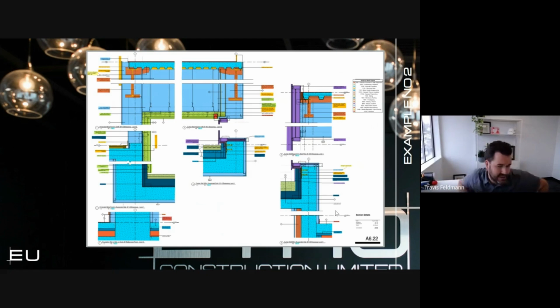So one thing that I forgot to touch on was actually when to do this in the tendering process. Obviously, this is a document that sets a baseline precedent for how we're going to tender the scopes. So we want to do this early on in the tender to make sure that the trades have enough time to talk to their, in some cases, subs, to make sure that the intent of the scope and how they're going to bid it is clear from an ETRO perspective early on.